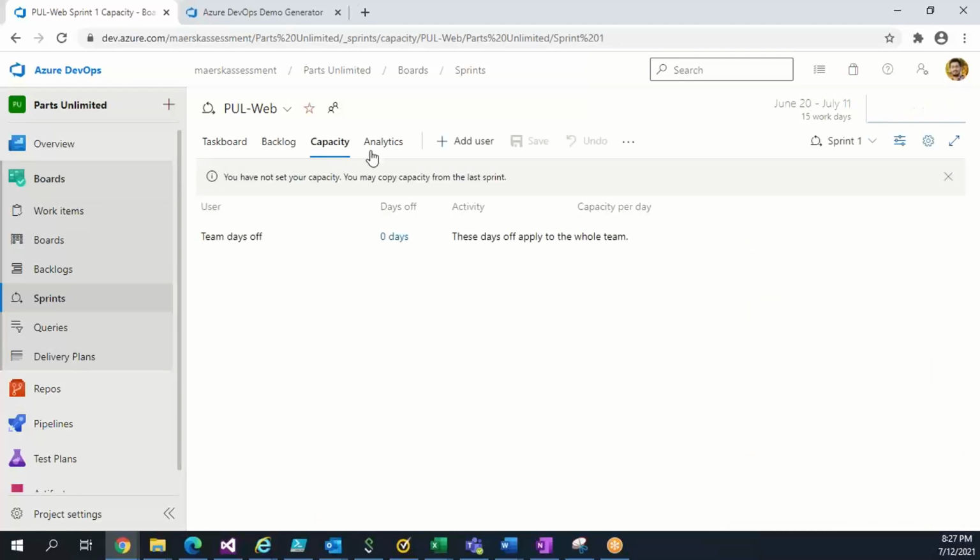So as we already know, our sprint is of 3 weeks. Okay, and in those 3 weeks, for one day teams consider 8 hours, like one guy is working for 8 hours. So if there are many guys in the team, the project manager will create capacity, defined capacity for each person.